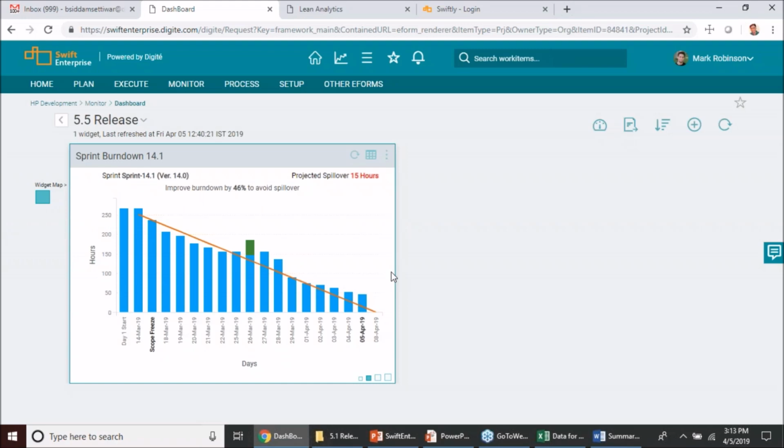So this calculation will happen on a daily basis, which wasn't the case earlier, wherein when you added a work item to the sprint scope, the bump wasn't apparent on the day on which the work items were tagged to that sprint. In fact, the overall remaining effort for the sprint would increase by that much. And that's why the change of remaining effort wasn't apparent.